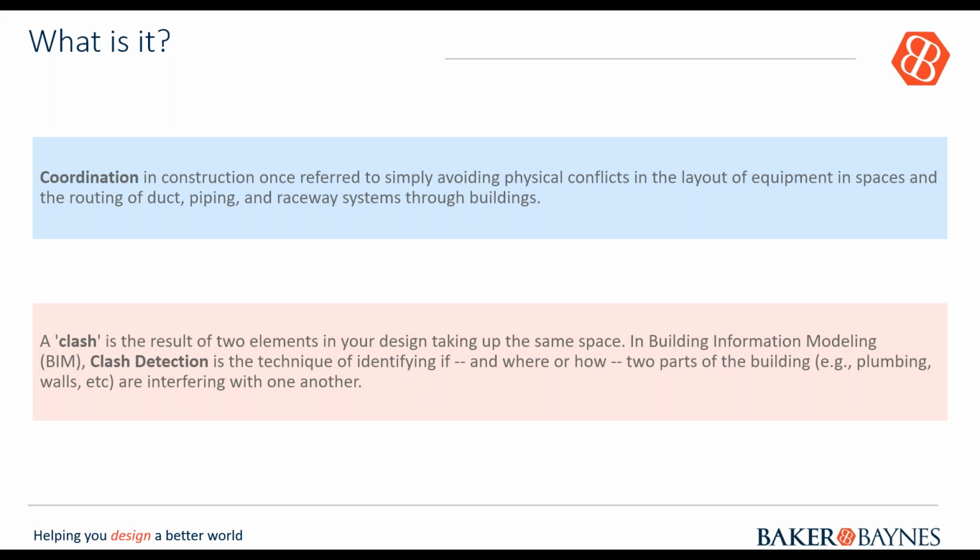A clash out of that would be basically if items from different disciplines, for example from the mechanical field and the plumbing field, clash in some way, then they would be building them on top of each other, which is wrong and doesn't really make sense. So we do a clash detection to identify these issues and see how best to solve them before they get onto site. Well, that's the more digital way of doing it.